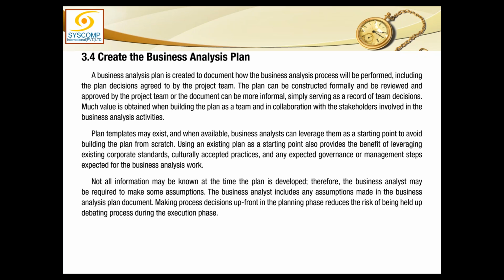Making process decisions upfront in the planning phase reduces the risk of being held up debating process during the execution phase. We do not want to be held up just because certain data is not available. So let's take an assumption, record that assumption and move on with our plan. Later on, if that assumption does not prove to be true, then we can always change it and amend the plan. So good planning will keep you going even in execution.